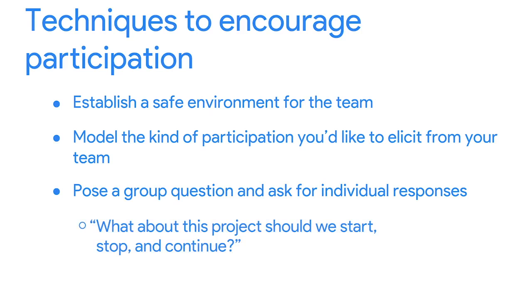And finally, if your team is participating but contributing only very recent successes and challenges, it may be helpful to review the project timeline. This is a technique for encouraging teammates to think further back in the project lifecycle to identify successes and challenges. If you remind your team of the project timeline, you can refresh their memories and spark more discussion about the entire project.